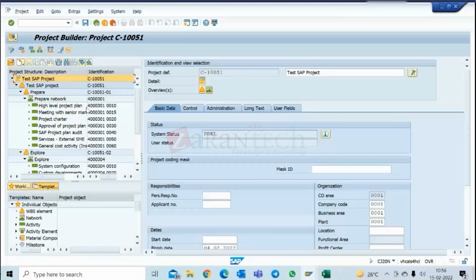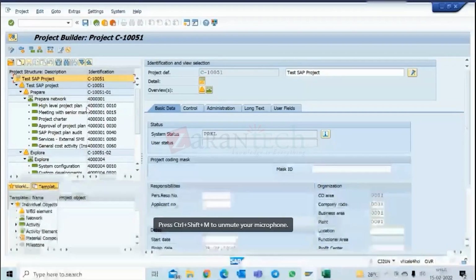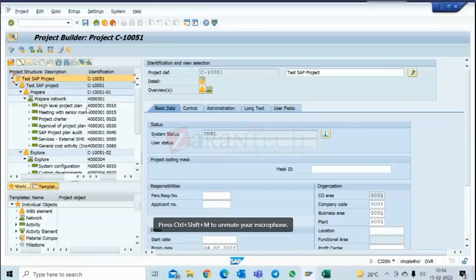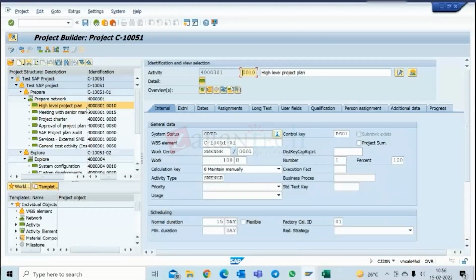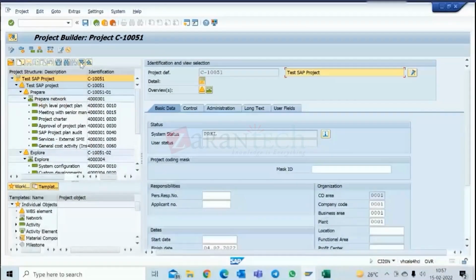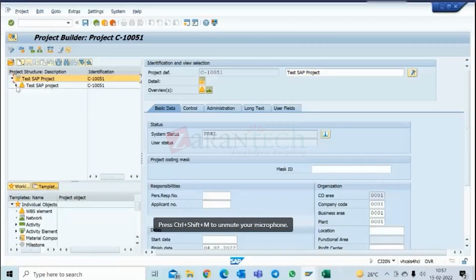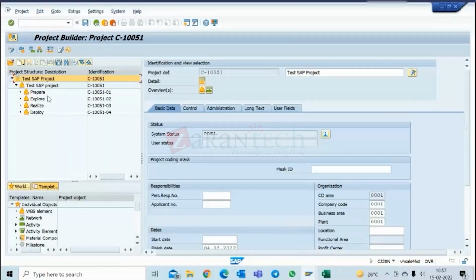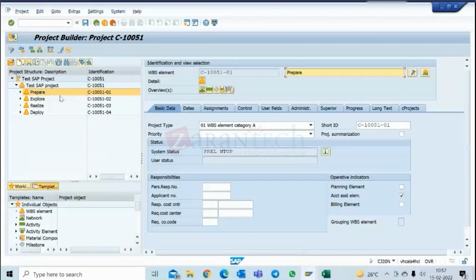So that milestone tells us how much we have reached in the journey. Now projects are also like this. It's like a journey, usually long duration, and we have to know where we have reached. So let's say this is my implementation project. I need to know where I've reached in my implementation project. There are some deliverables also, and based on those deliverables that much is complete or that phase is complete. If it is a customer project, I can bill a certain amount to the customer. That is what we use milestone for.